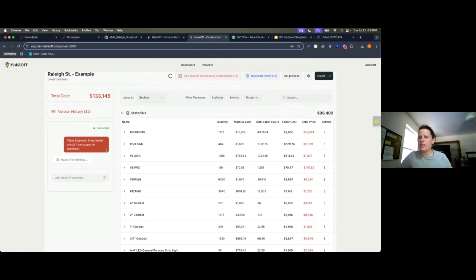So when you added the PVC and all the copper and this many runs, for every foot we needed to go, it was going to be $700. Whereas when we added an extra run, but shrunk all the wire and all the conduit, we were at something like $400 a foot. I think it was probably in the fives, like 550. So we were able to save money, $150 a foot, but now we're going 40 feet with all this, so all of a sudden this becomes a very material number.